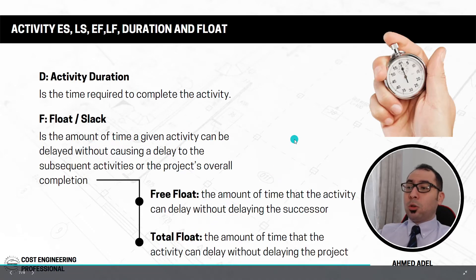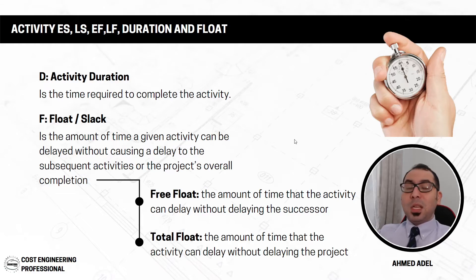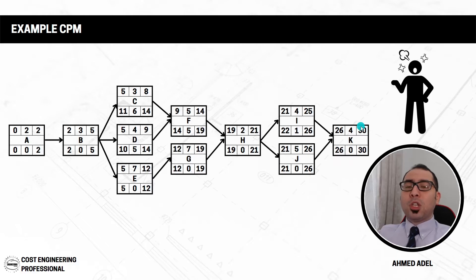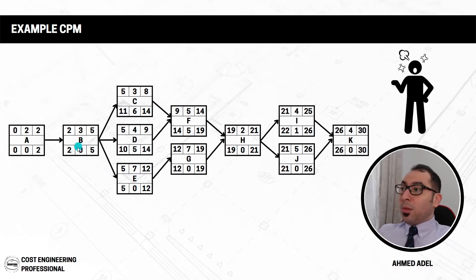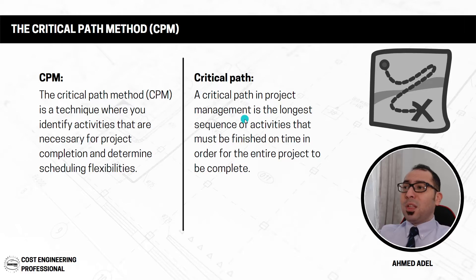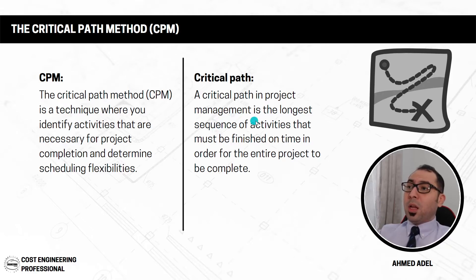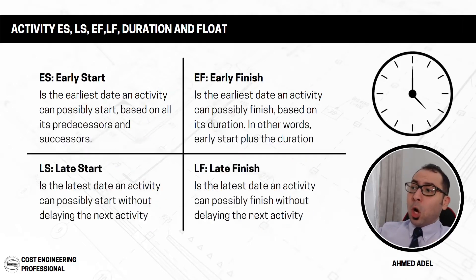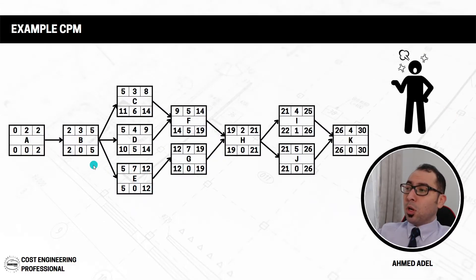Since the early start equals the late start (both are 2) and the early finish equals the late finish (both are 5), the total float for activity B is zero. A total float of zero means that if this activity is delayed by one day, the project will finish one day late — instead of finishing in 30 days it would finish in 31. This means activity B is a critical activity.